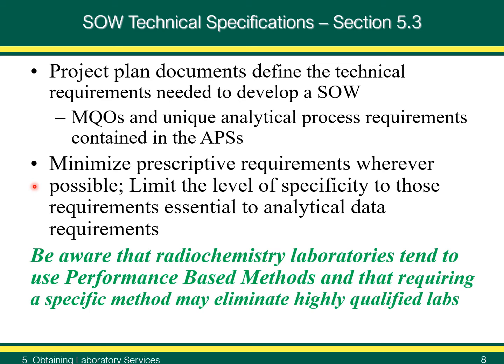Let me repeat what I said above. MARLAP recommends against requiring specific radioanalytical methods unless methods are prescribed by regulation. Consider that a project may be raising its risk by specifying a particular method in an SOW APS. All too often, methods are prescribed for use beyond their scope and applicability. For example, drinking water methods are too often prescribed for solid matrices.